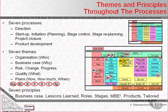Every time we receive a risk or an issue, we are of course dealing with risk, and therefore every time we ask the project board for their advice, we're considering the risks. At every end stage, we consider the current risk profile. And at the end of the project, we consider whether risks that the project has been caring for are still relevant to the organisation and thus must be handed over to somebody who's going to follow the project.